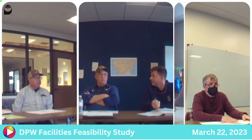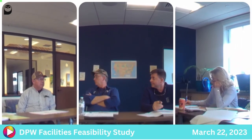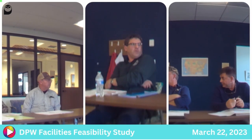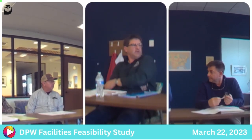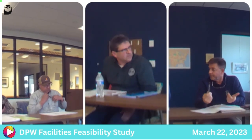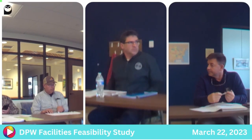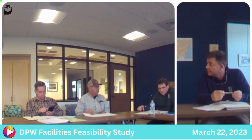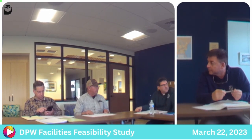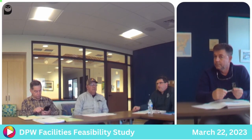So that would be over Martin Maple then, what we just did, right? No, because we went from the bike path to the South Maple intersection. The rest of it they did was part of their project, so we might be double right there. Oh, God, yeah. So you're talking a million. Could be. And that's just linear footage of pipe, never mind, when you do this, you got to have, you know, hydrants every 500 feet, valves every 1,000, I mean, all that adds up.